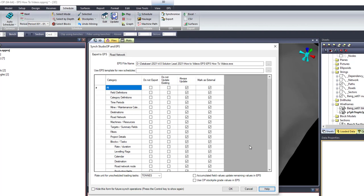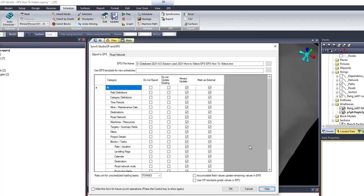And the Mark As External option means that the corresponding data in EPS will be marked as external, meaning that the EPS user cannot delete these records.